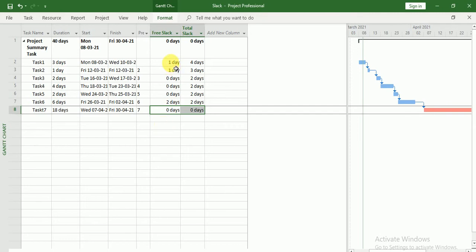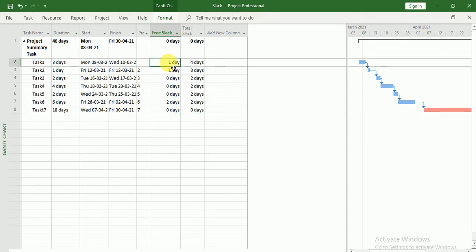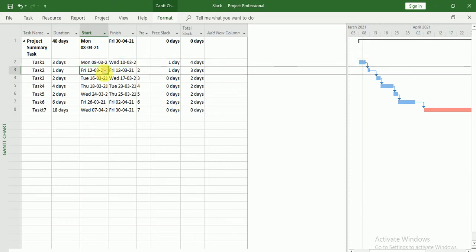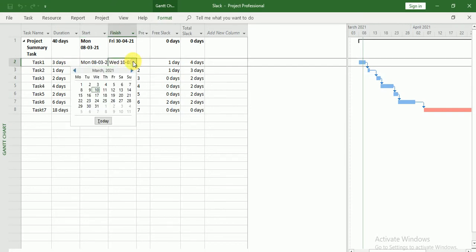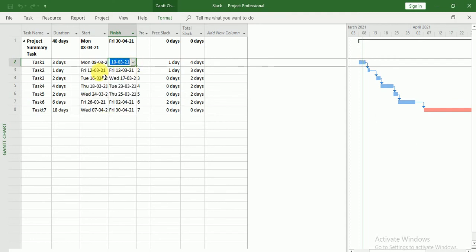Now if you will see Free Slack, it is one day. Why? Because this task is going to finish on 10th of March and the next task is going to start on 12th of March. So here we have one day relaxation. We can finish this task on 11th of March so that our next task will not be delayed.